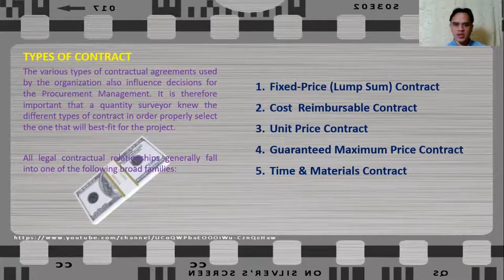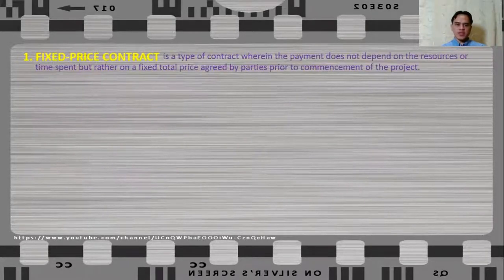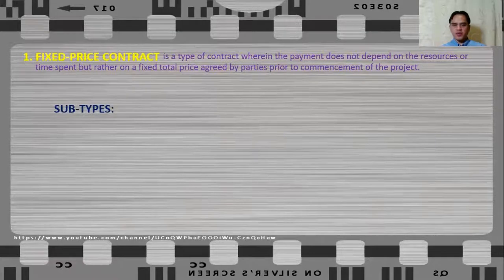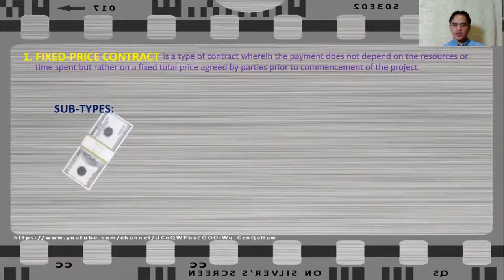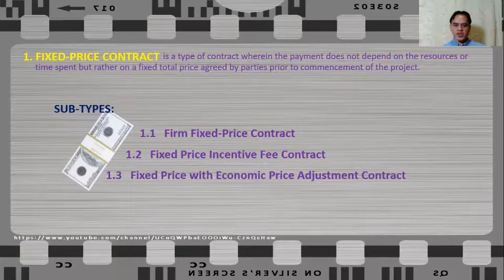Let us discuss in detail these types of contract. Fixed price contract is a type of contract wherein the payment does not depend on resources or time spent, but rather on a fixed total price agreed by the parties prior to commencement of the project. Fixed price contracts have the following subtypes based on the manner that the contractor is paid: firm fixed price contract, fixed price incentive fee contract, and fixed price with economic price adjustment contract.